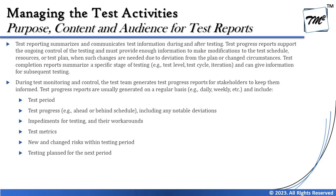A collection of sprints forming a release may have a test summary report. In many organizations, the summary report is also called the test completion report. These reports are not strictly standardized, though IEEE and other standards do provide templates. Organizations have the freedom to define report content based on stakeholder and business needs. Test reporting summarizes and communicates test information during and after testing. Test progress reports support ongoing control and must provide enough information to modify the test schedule, resources, or test plan when needed.